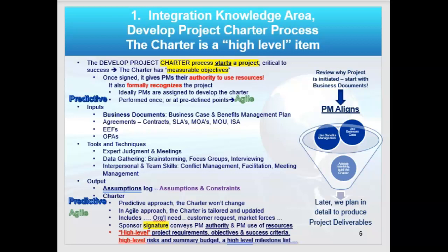This is where a project starts. This is where the project manager is formally assigned, normally. And this has two key aspects. It formally authorizes, recognizes the project, which authorizes you, the PM, to use resources.